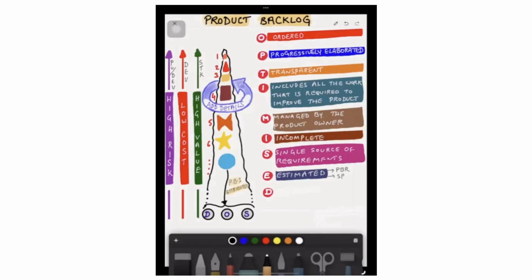If some clarifications are pending and the product owner wants a couple of days to check with the stakeholders to get those clarifications, in that case, it is okay to estimate in the sprint planning. But my recommendation and preference would be to estimate as much as possible in the backlog refinement.